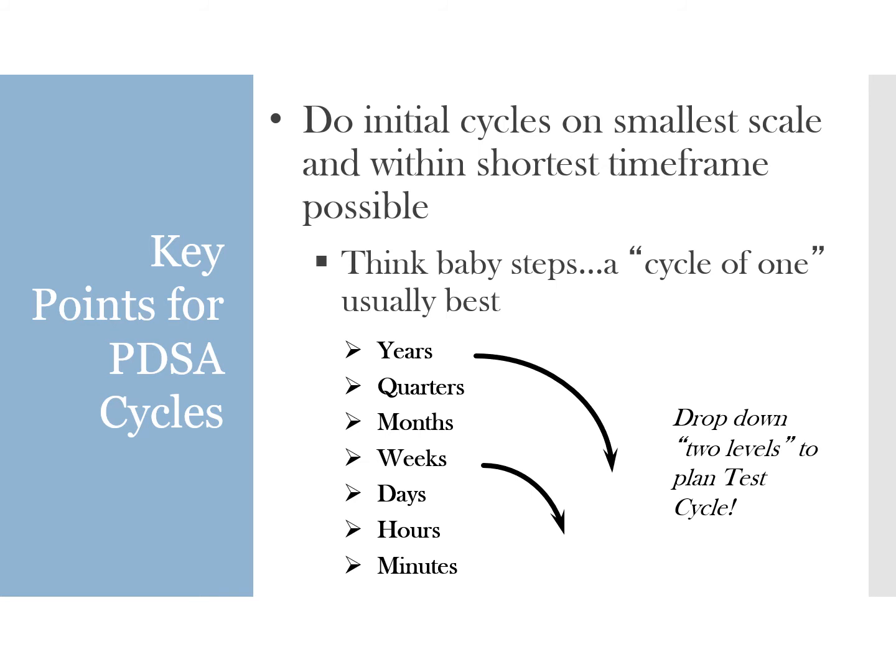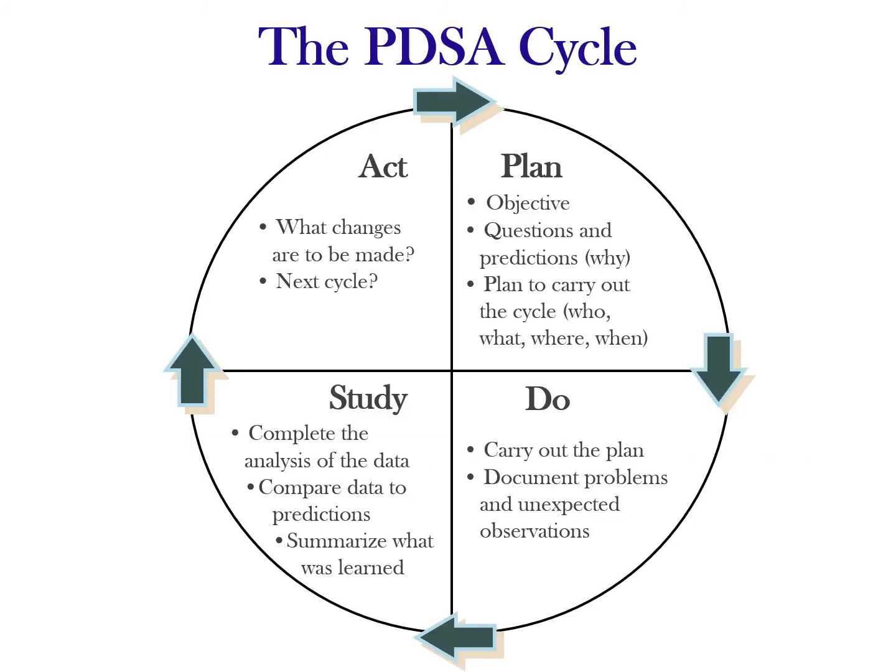But you also want to test things out and see what works best. So in that planning phase, just keep thinking one clinic afternoon with one provider with a handful of patients, and let's see how this works, and then we can always scale it up. So once you've put down and had some time to figure out what you're going to do in your planning phase and how this ties back to your evaluation plan, you can move to the next step, do.